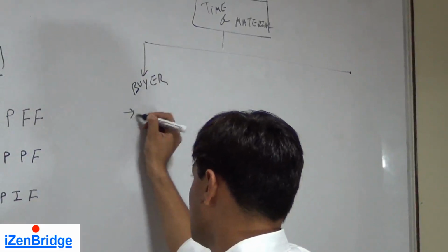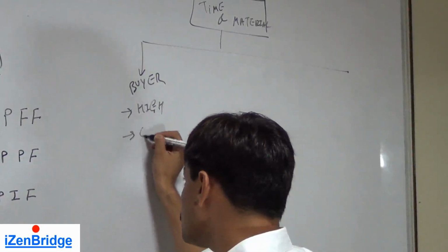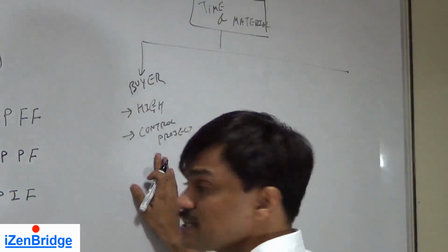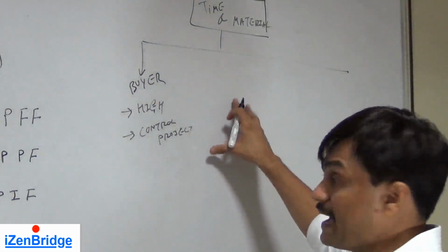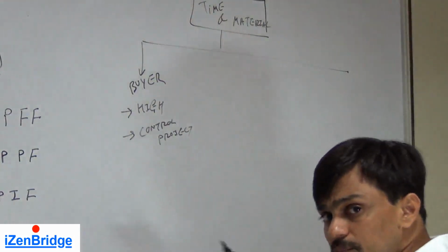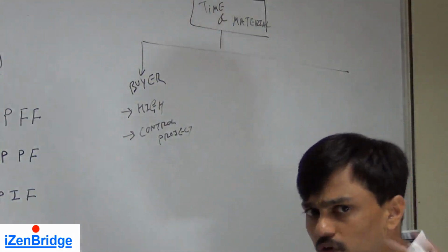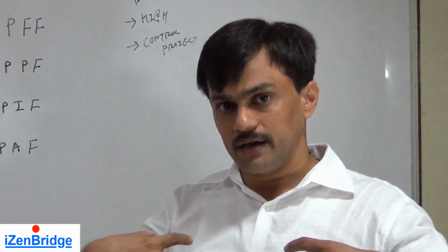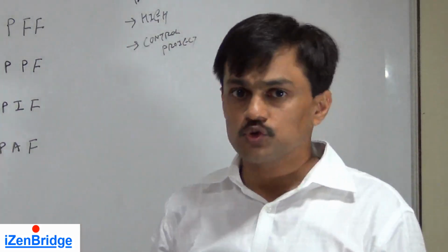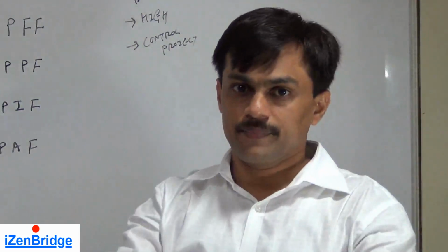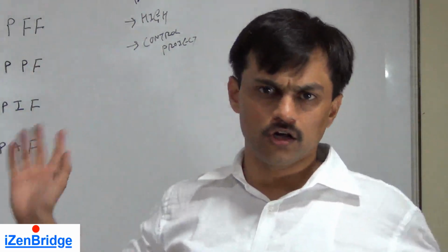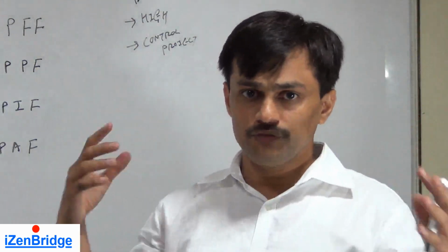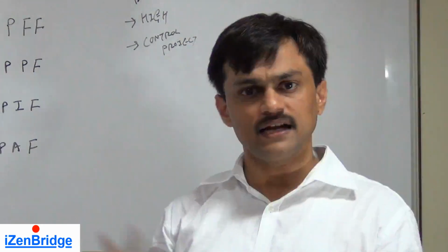Now, similar to cost reimbursable, the buyer has high risk and needs to control the project or procurement, because he has a responsibility of utilizing the man and material provided in this contract. Think of a staff augmentation project. Staff augmentation projects are usually time and material, where as a supplier I am providing you 10 resources. These 10 resources will work on your testing. I am charging $1,000 per resource per month. So that's the contract. I will provide you the test engineers. They will cost $1,000 per month, and that's it.